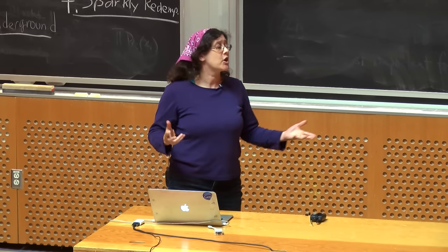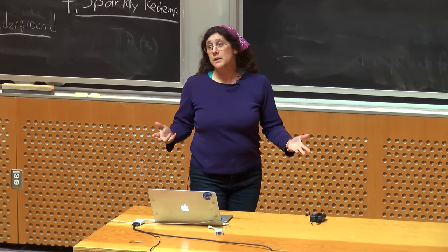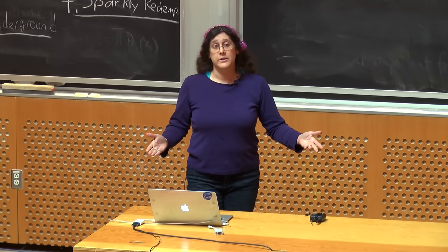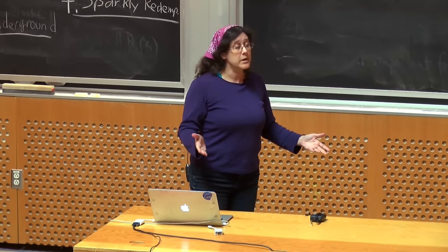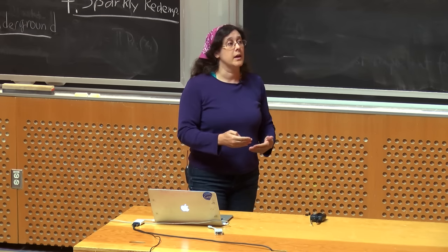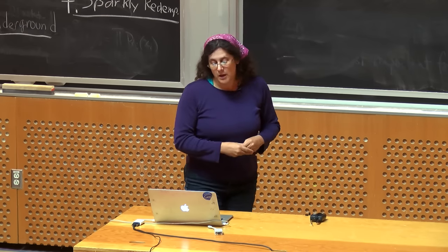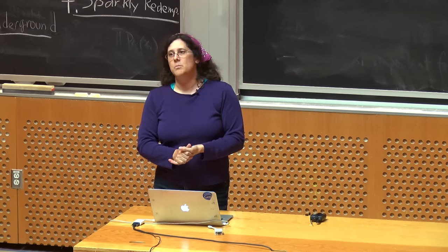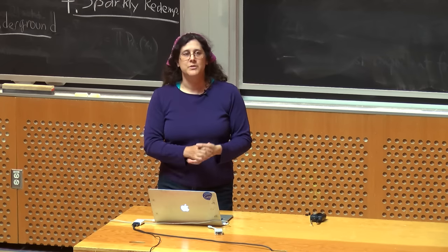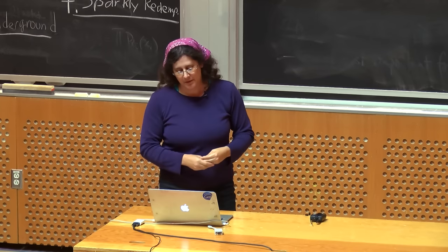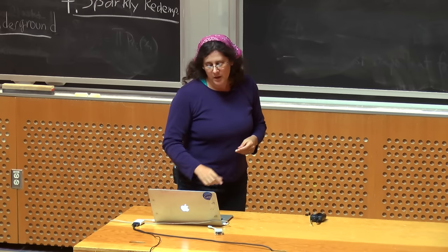For example, sprints are just one big time box. You're defining that, here's the set of things we're going to get done, we have a week to do them in. When we're done with that week, we're going to stop and see how much we got done, and we're going to move on from there and reevaluate. Meetings can do this too. And all meetings in Scrum should be time boxed. It's one of the classic Scrum rules that meetings are time boxed. They have a limited amount of time that you spend on them.